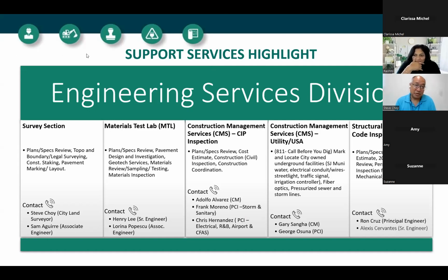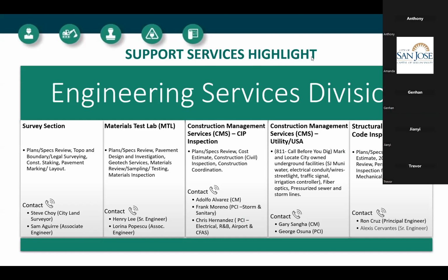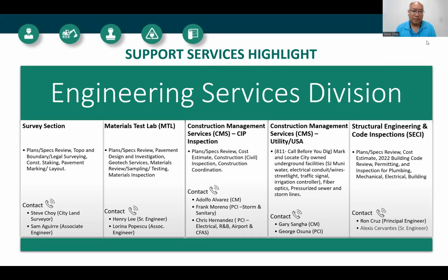As I mentioned, I'm the city surveyor, so I'm most familiar with the survey section. I might give that a little bit more detail, but a lot of that information will carry through to the other sections. So a survey is involved in almost every phase of your projects here. Phase one, your project visibility, we're going to go out and provide you the site conditions, which is a topo, and boundary or property lines, so that you know where the limits of your project can be.